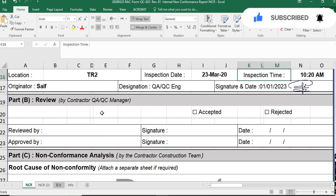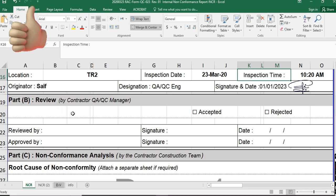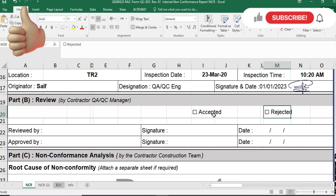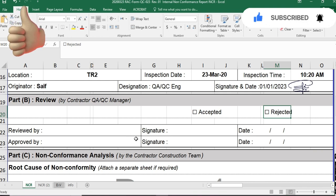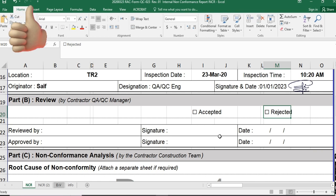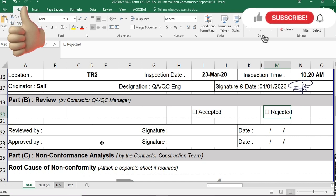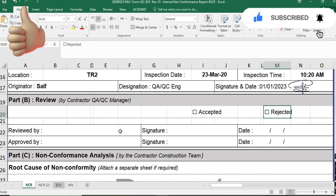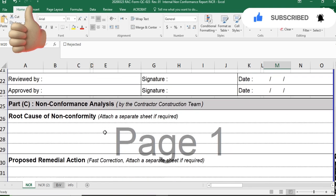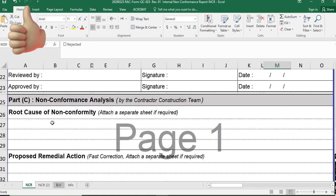The QAQC manager will review the internal NCR and either accept or reject it. If he accepts it, you send it to the contractor's construction team or subcontractor. If he rejects it, you do not send it to the construction team. After approval from the QAQC manager, you proceed to send it to the construction team.